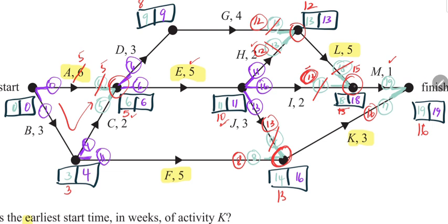Now in order to get that to be 15 here, what is it that we can add to 12 to get 15? So 12 plus 3 is 15. So we change this to 3. We reduce L by 2 and we get 15 here.